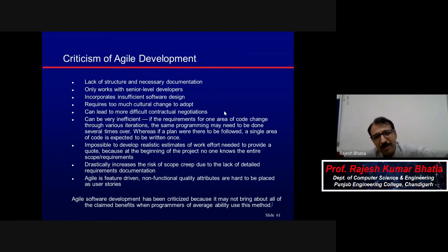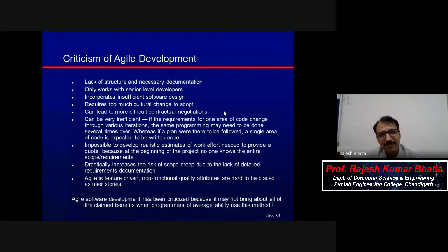So the earlier sprints will have all the critical functionality. Why? Because all those features are prioritized. So higher priority features are released earlier. The client has more experience using those features, and of course their experience and testing will be much more compared to the less prioritized features.